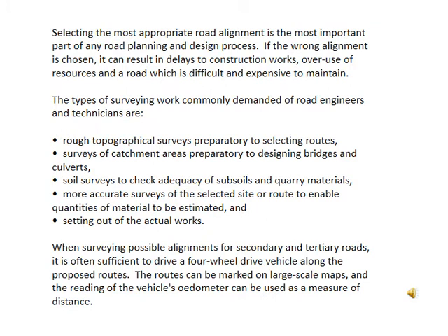So the soil survey, the soil condition, is also important; we have to check the subsoil condition. Then a more accurate survey of the selected site or route to enable quantities of the materials to be estimated. So the materials selection has to be done, and also the setting out of the accurate levels. So these are the important aspects in the road design.